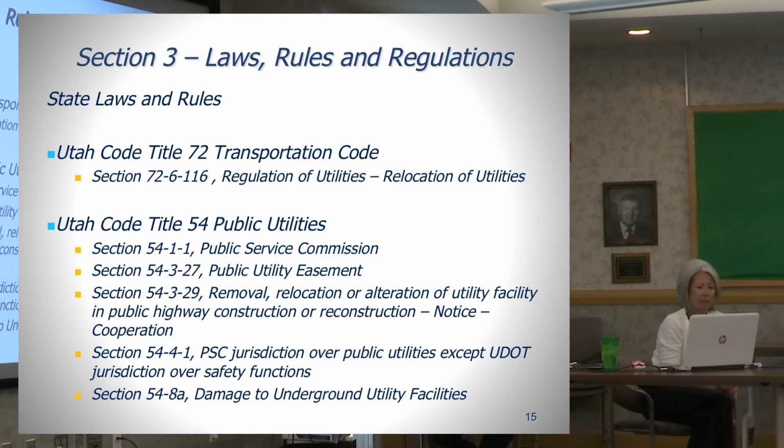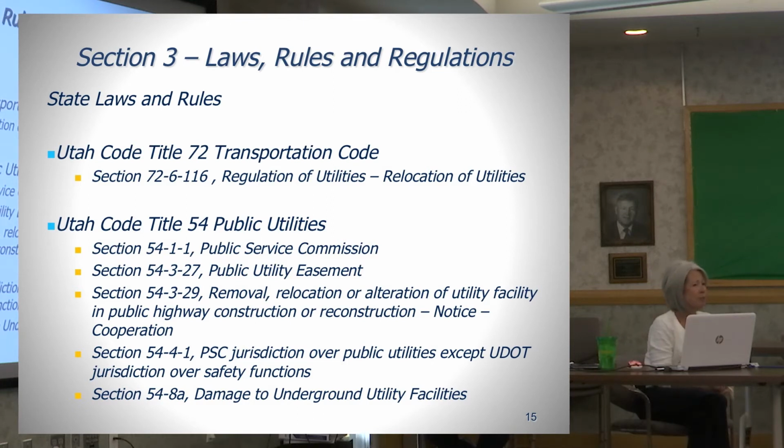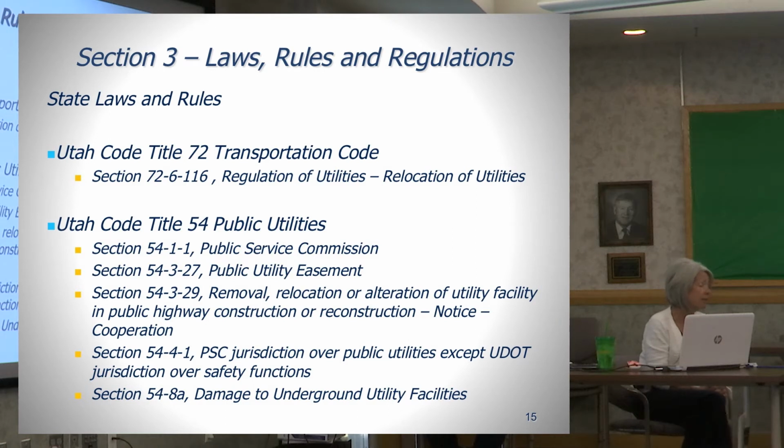relocation required by highway construction or reconstruction, notice and cooperation. This is the code that was proposed by the utility companies in response to their feeling that they didn't get enough advance notification of highway construction projects, specifically from local governments. The cities and municipalities weren't informing the utility companies when they were doing their own projects, but it also applies to UDOT.